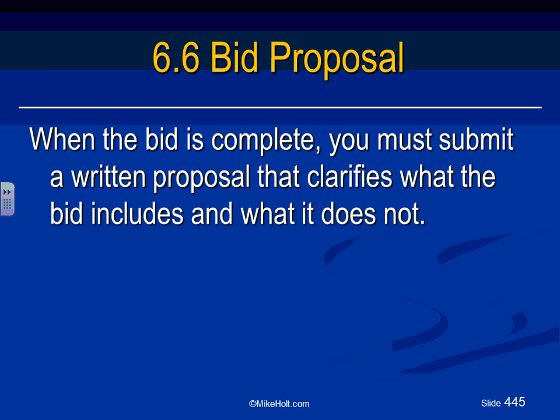You analyze the selling price before you send it to the owner. After you feel confident of that value, this is what we're going to go for, after we added everything, then you need to stick that number in something called a bid proposal that you guys have done with your friend Chad in the residential project, and you will be doing it in the commercial project on Thursday. And that will be your legally binding document that when you sign it and the owner signs it, that will be the legal contract between you and the owner.